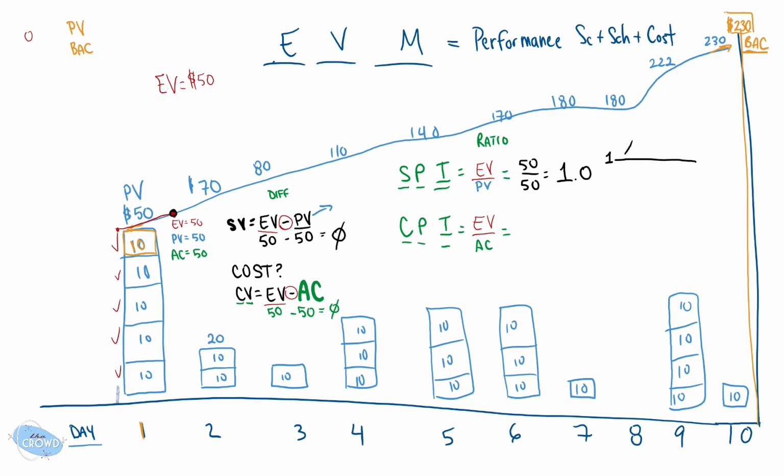If you're higher than that bar or lower than that bar, there could be reasons for that. Maybe you are ahead of schedule and you're getting more output than expected. Maybe you are behind and getting less than expected output. You could even put some control limits in there so that if anything were to go outside a certain control level, in that case, we want to put an assignable cause to why.